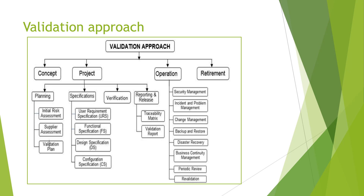After tracing all requirements and specifications, we prepare the Validation Summary Report, which briefly describes the deliverables, any discrepancies encountered, and the final conclusion that system validation was completed and the system is ready for the live GMP environment. After this, the system is released.